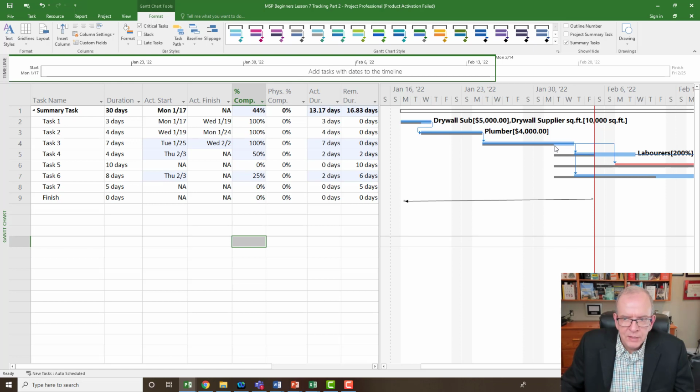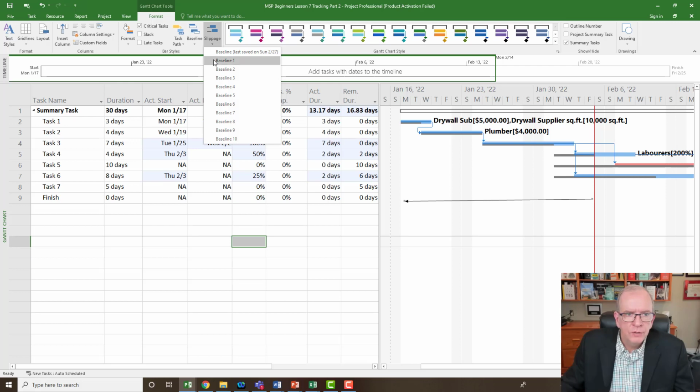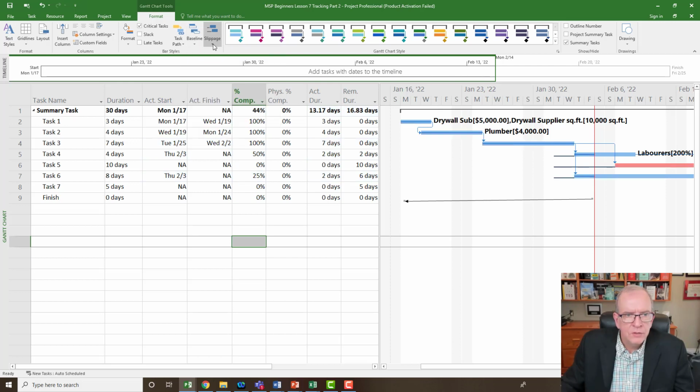And wherever you see this dark line, that's the baseline. And then this is what it's extending outward. Or you could also say, show me slippage, and not the baseline. Oops, I think I shut it off there. So that's the amount that the project is slipping, right?